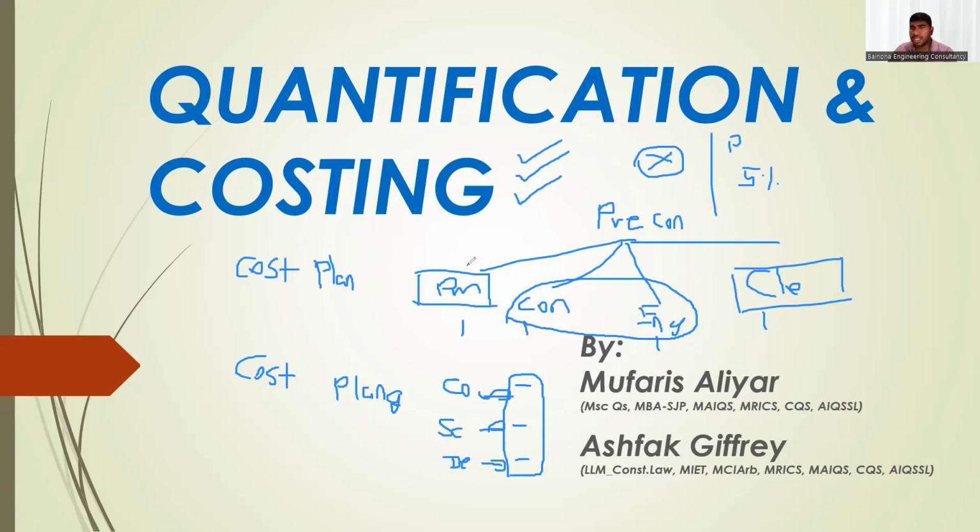Tender documents, as we all know, consist of volumes. Let's say volume 1 is the condition of contract. Volume 2 is the specification. Volume 3 is the drawings. For example, volume 4 is the bill of quantities, and volume 5 is health and safety, something like that. These volumes, along with support from the architectural team and the specification team, the quantity surveyor will compile, because most of the work here the quantity surveyor is doing.